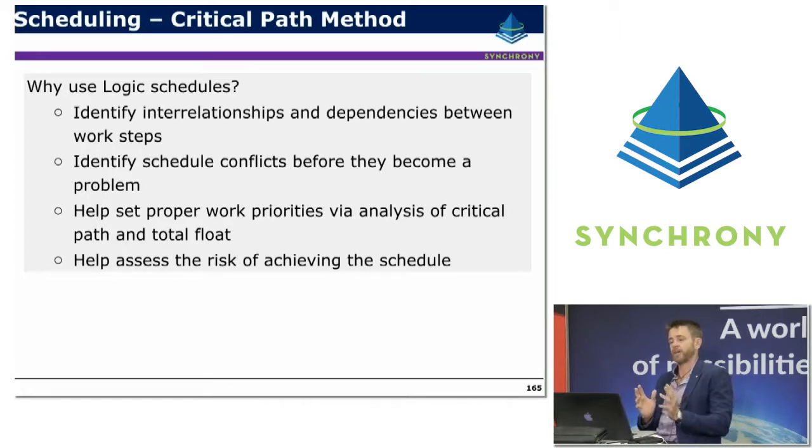Some of them might be very critical. These might be activities that once they slip or are delayed, are going to have a big consequence, or are going to delay the final completion of the project. Where there might be other activities where we have a bit of room to move, we know that we can relax, focus on the higher priority activities, and there's going to be no major consequences if we let some things slide a little bit. It's really important to use the schedule as a model to give that information to the project team so they can allocate resources and prioritise in the best way.